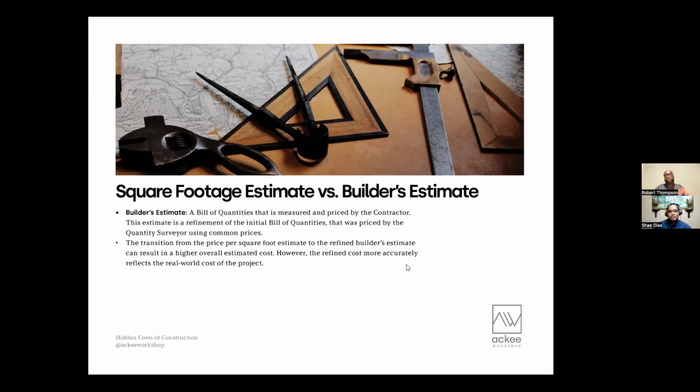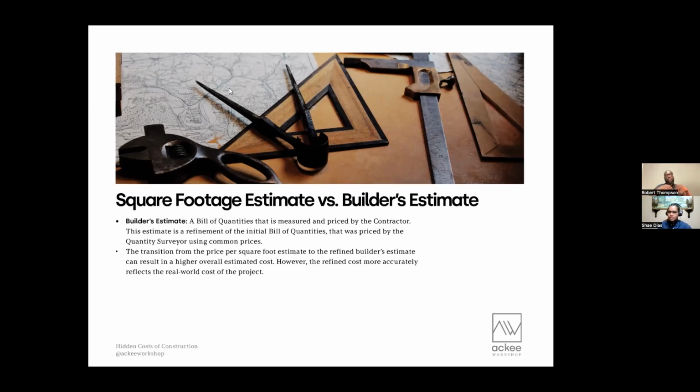Something else I would add is that with having the quantity surveyor prepare the bill of quantities, you would have somebody that's taking care of your interest do an initial pricing so that you could have something to compare when the builder's estimate comes back. And that's always important to understand. Plus, the quantity surveyor would assess that builder's estimate for you to make sure that it's fair. Yes, definitely.